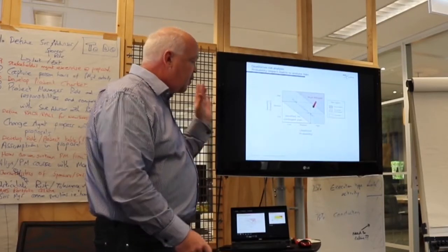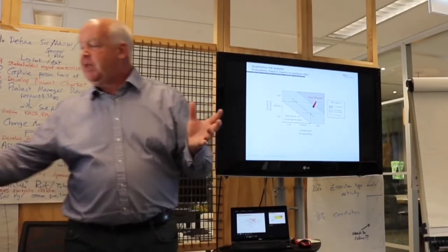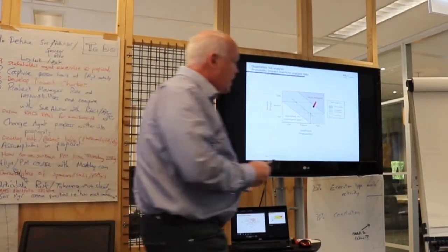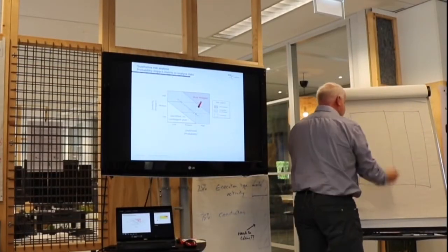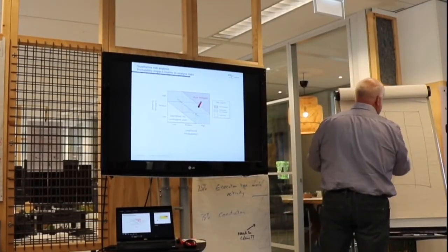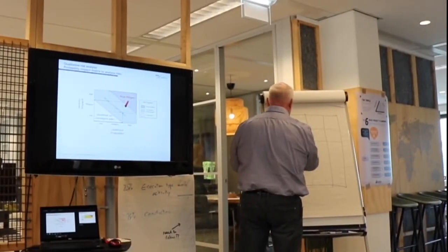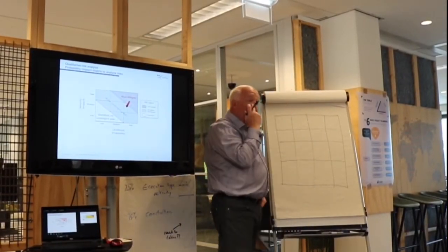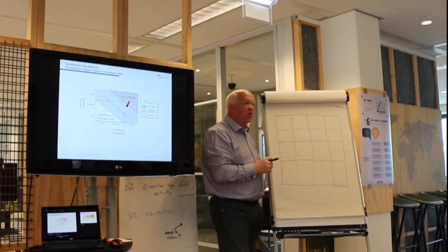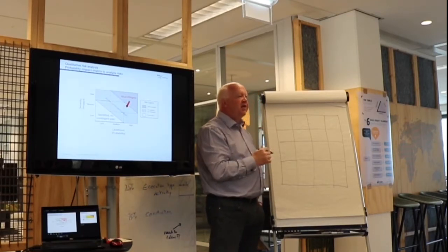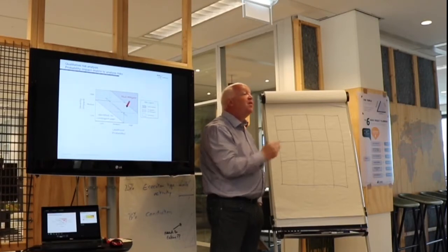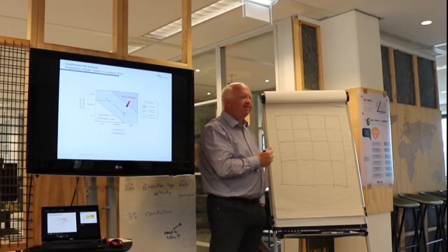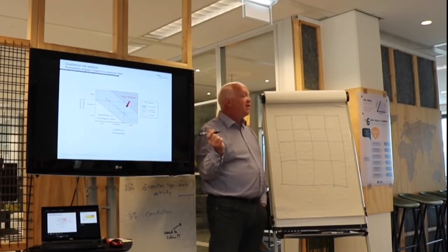The easiest thing to do, and this is a minimum that any project should be doing, is a risk matrix. Now, I prefer not a triangle, but I prefer a 16 box than a 9 box, or even a 25. Why do I prefer 16 rather than 9 or 25? Because I don't like 25. There's no middle. The 9 and the 25 have a middle.